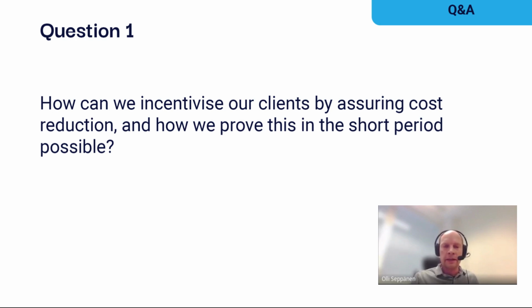Or you can start to decrease the schedules. I said the result that just 34% of the presence is required to actually achieve the current schedule objectives, which means that there's an opportunity to cut schedules to half for most activities. So once you prove to yourself that this works, then you can start to shorten the schedules by eliminating fragmentation of work. And that will obviously lead to decreased general conditions, decreased need for daily costs, and faster entry to market for the investment.